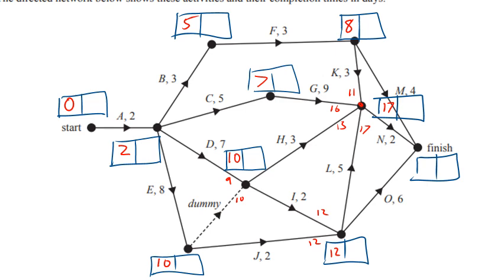Quite annoying to put that box in for this vertex here. Coming down, we've got 8 plus 4 is 12, 17 plus 2 is 19, that's good, we've got a 19, and 12 plus 6 is 18, so my finish is 19. That was my forward pass where I'm looking for the maximum, and I'm adding. I'm going to choose green to go backwards. I'm looking for the minimum now, and I'm subtracting, so it's 19. Going back out here, 19 minus 6 gives me 13.